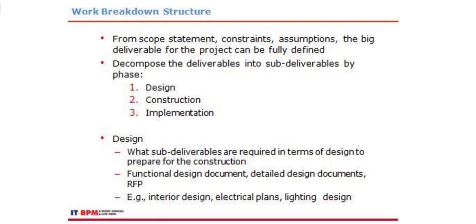Additional information: decomposition is the subdivision of project deliverables into smaller, more manageable components until the work and deliverables are defined to the work package level. The work package level is level 3, the lowest level in the WBS, and it's the point at which the cost and schedule for the work can be reliably estimated. Again, the level of detail for work packages will vary with the size and complexity of the project.